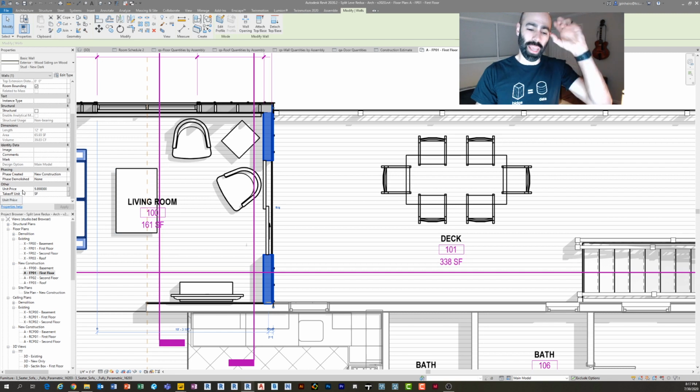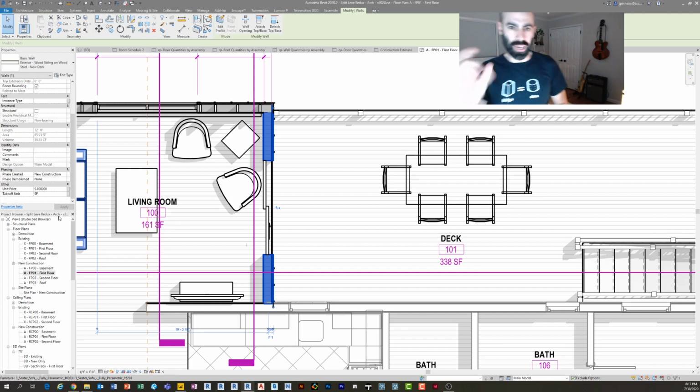So what I did real quick is I made a project parameter that's an instance parameter, called unit price and takeoff unit. The takeoff unit is going to be valuable on the Power BI side, to tell Power BI what I'm multiplying my unit price by. So I'm going to pump out whatever exists. For every element that I'm exporting and using in Power BI, I'm going to export an area and a length, I believe. That would be linear foot and square footage. Right now I know it says unit price, but it's kind of an assembly price. I guess that's not the right term, but whatever.